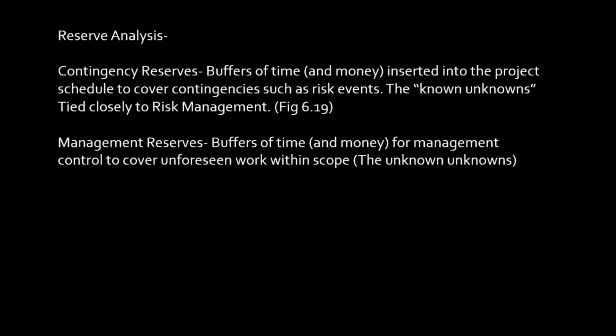Now we'll talk about reserve analysis again. Like I said, I gave you a quick description, so let's talk about it again. Contingency reserves are buffers of time inserted into the project schedule to cover contingencies such as risk events. These are called the known unknowns. I put these contingency reserves on each of the tasks and on each of the work packages. For lack of a better term, they are the fluff that I put into my estimates.